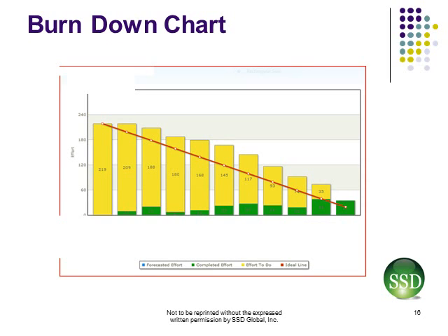Whereas PDCA has a tendency to use WBS and therefore create charts such as the PERT chart that you just saw and the Gantt chart, the slide previous to that, Agile prefers to use something called the burn down chart. Looking at this example, you can see that the burn down chart shows the work that has yet to be completed.